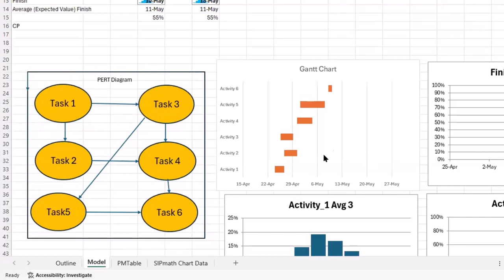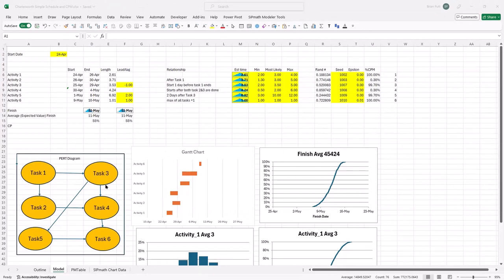You can also see that relationship here in a Gantt chart, although this is very deterministic, but I'll show you later different options here, how that Gantt chart moves. For each of these tasks, we need to identify a distribution, and typically a triangular distribution is used. You can get fancier, but in the end, it probably doesn't matter because you're adding up these things, although they are correlated in the sense that one task is a function of the other task being completed. But in any case, I put in some random numbers here,